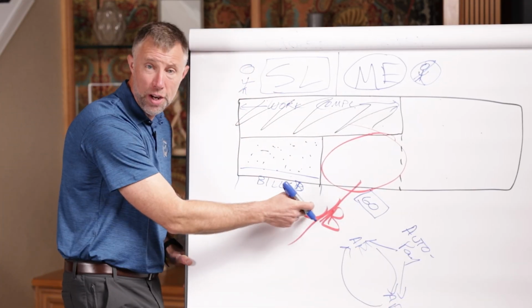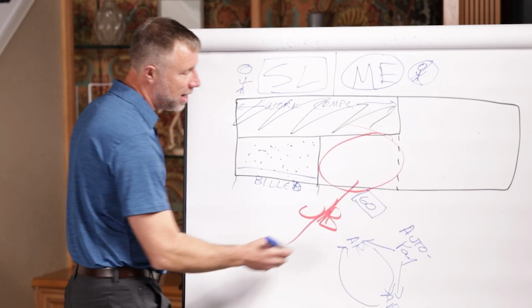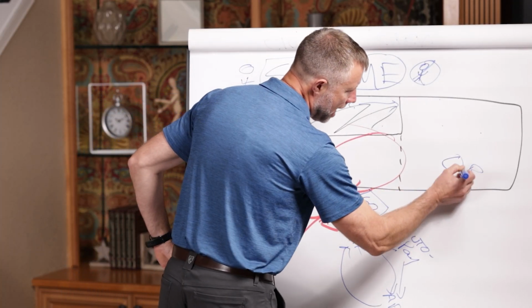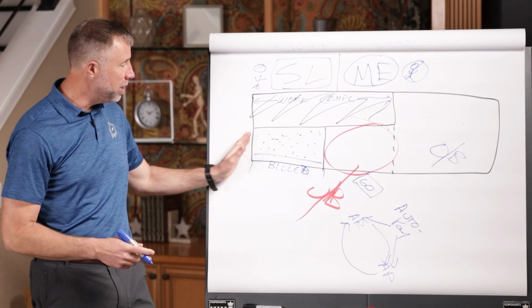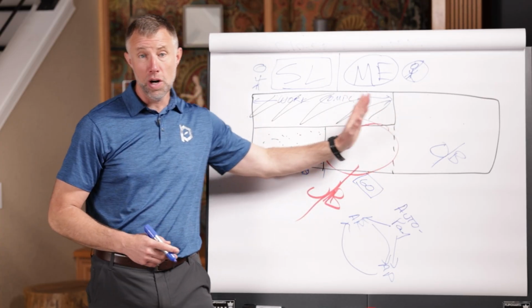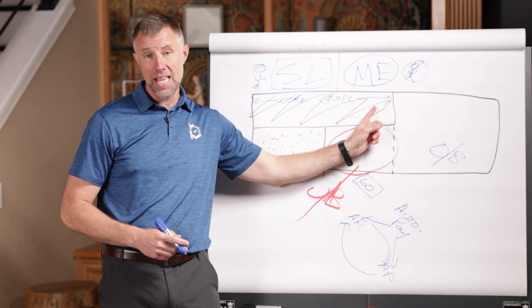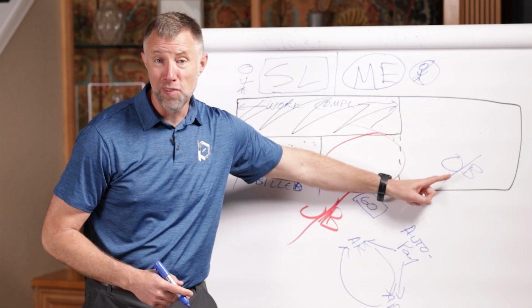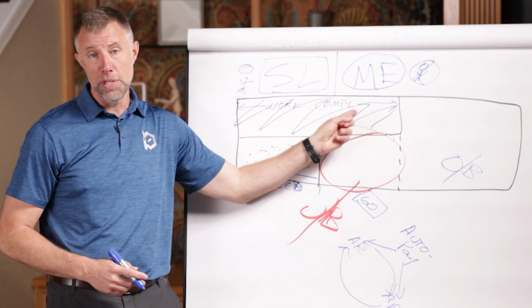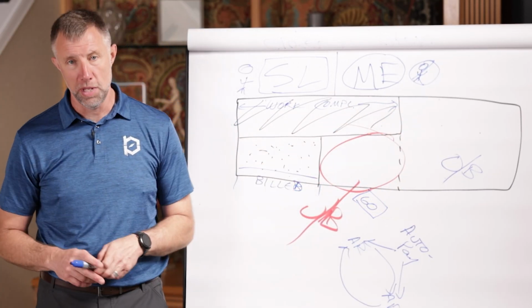So get creative with your terms so that you can increase your cycle time and your cash flow to try to eliminate underbillings, and also be very careful because on this side, you can actually do overbilling, where you've billed for work that is not yet complete. You already have the money, but you haven't spent the money yet. So you assume that you've got an inflated bank account when you still have bills that you've got to pay for this work that's going to be completed.